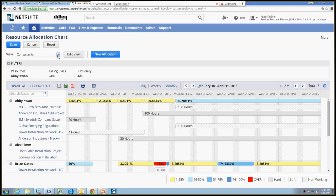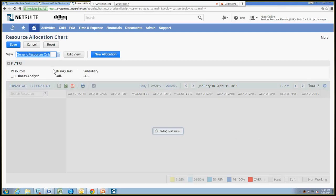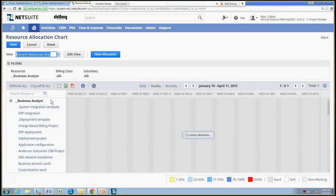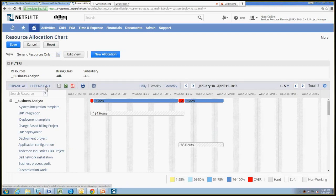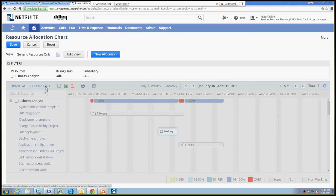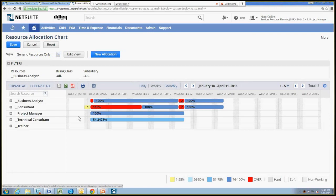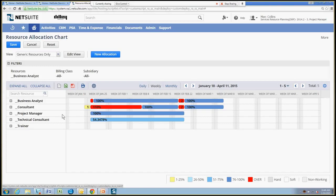So if I change this to generic only, then I collapse. I'll take a look and see that with a project, when I'm forecasting on the future, I may not know exactly which person is going to be working on the project. But I do know they'll need certain type of skills. So I'll need a consultant, a business analyst, and so on, scheduled into the future on projects.